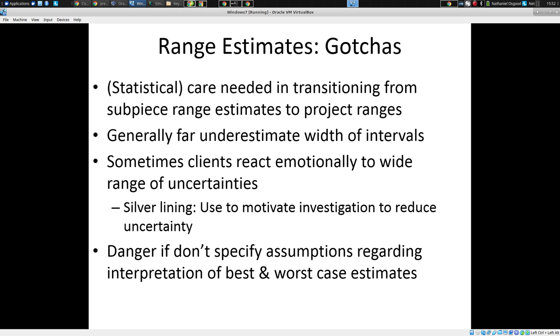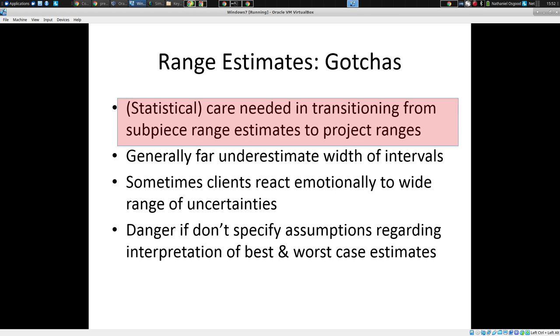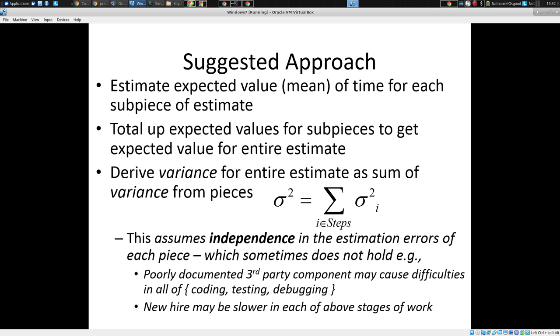There's a whole set of methods which, given the need to cover additional materials in this course, I'm not going to hold you responsible for, but you should know that the literature has extensive documentation, including this book, for how to work with this. To go from range estimates or three-point estimates, like best, worst, most likely case, to compensate for our tendency to have too narrow ranges. And the basic idea here is that we end up adjusting for or compensating for by growing our ranges, okay?